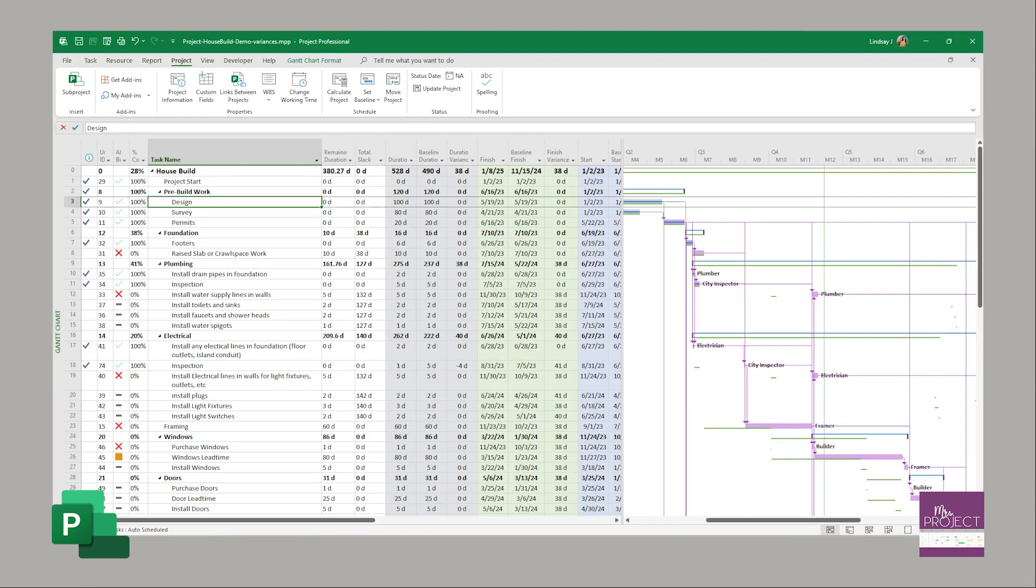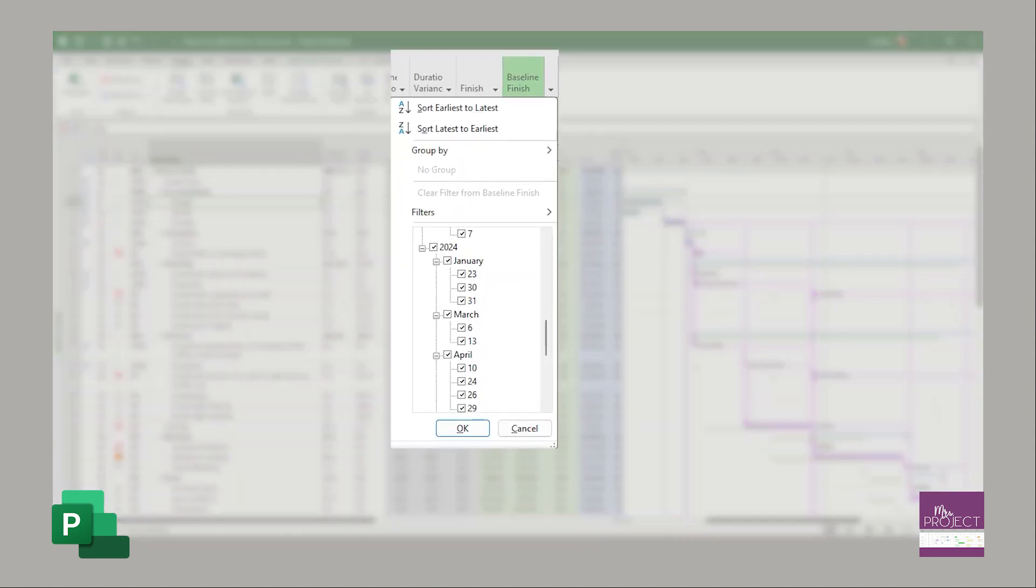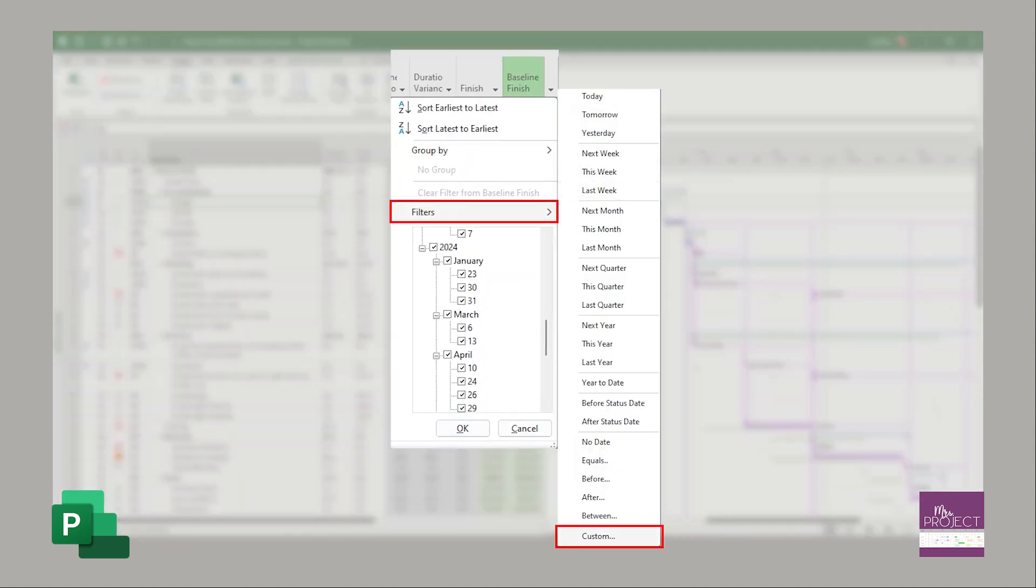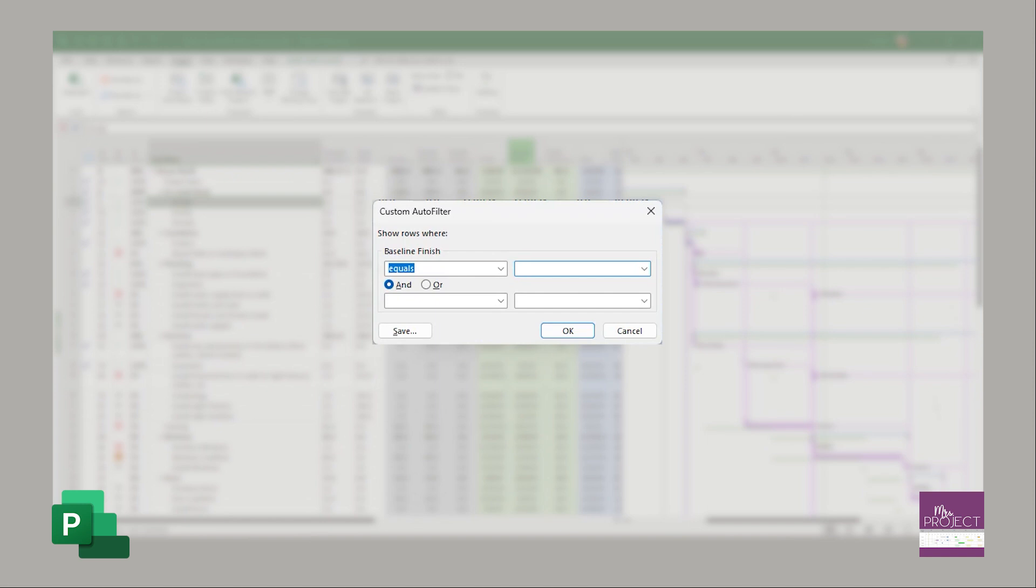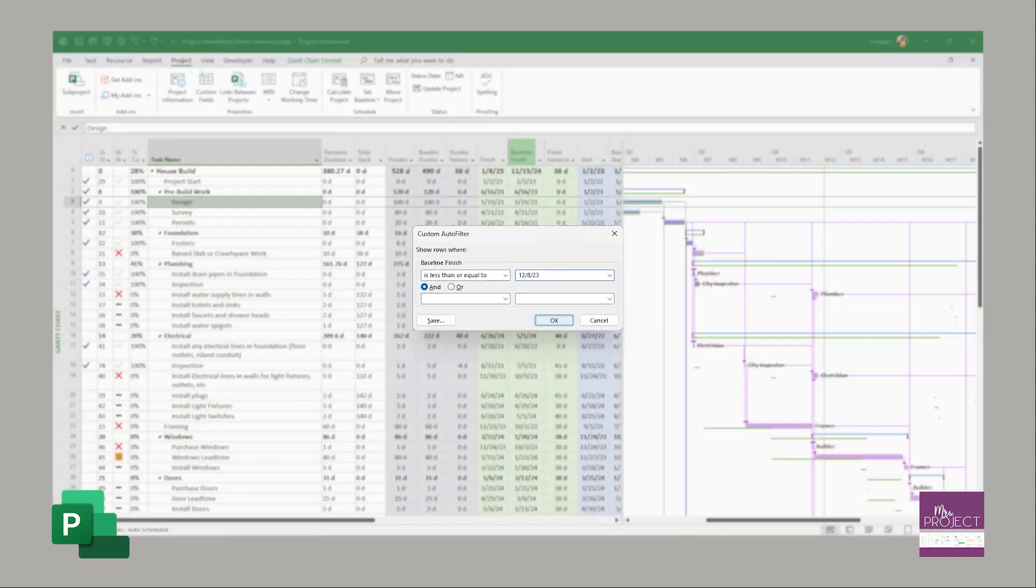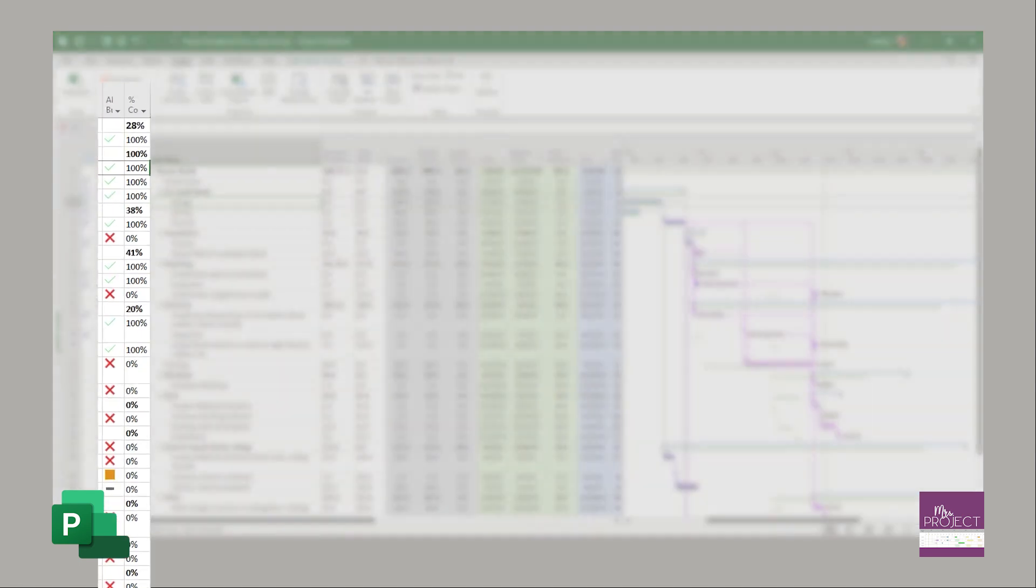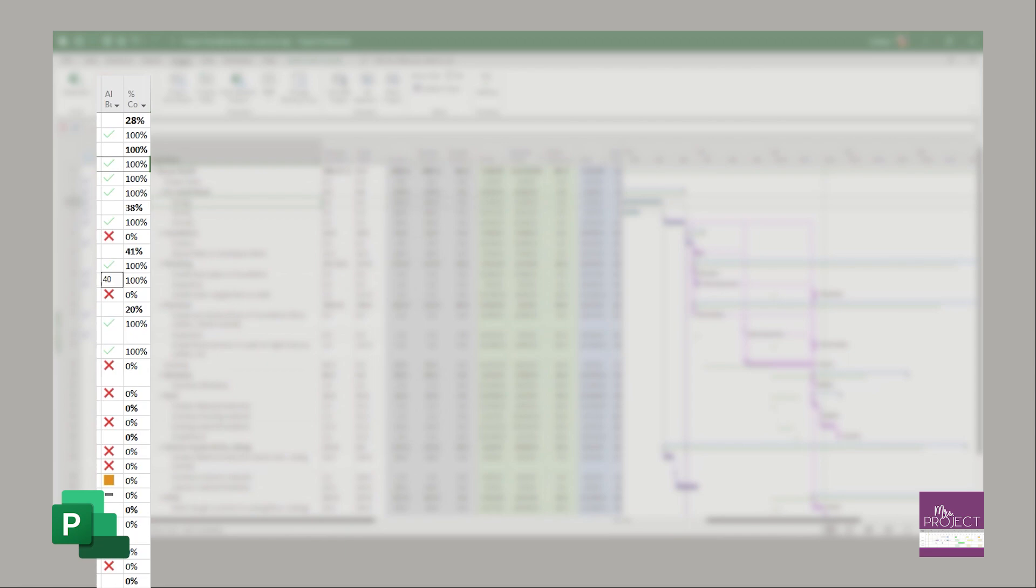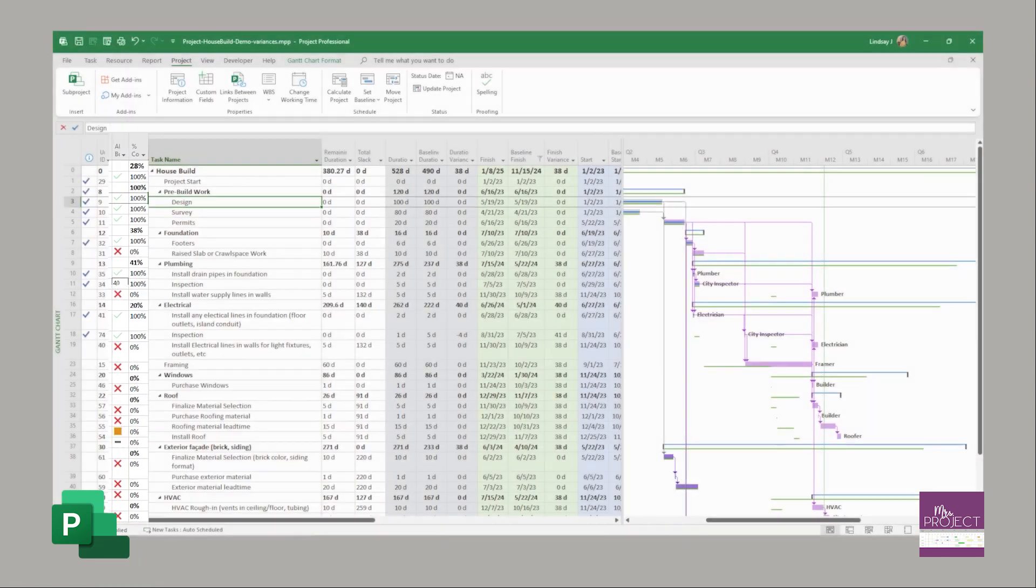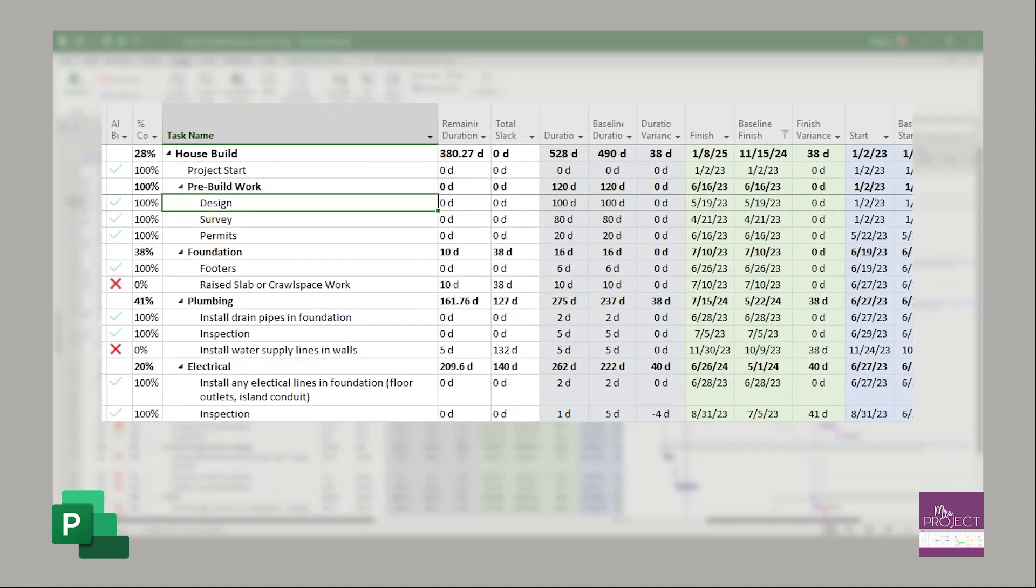In my example, I said we were using December 8th as a status date. We're going to filter on our baseline finish and go down to custom, then say is less than or equal to, and type in 12/8 and say okay. This is how many tasks. You can manually count how many tasks that is. You can see it's looking at both finished and incomplete tasks.